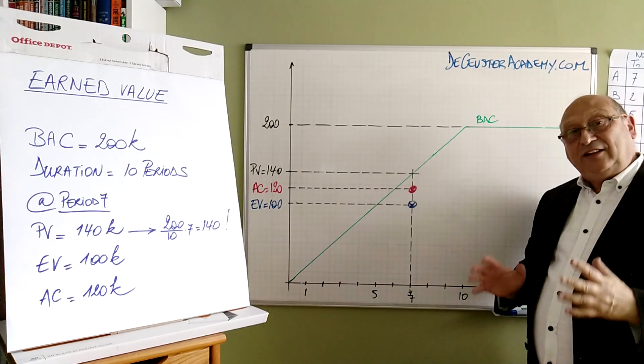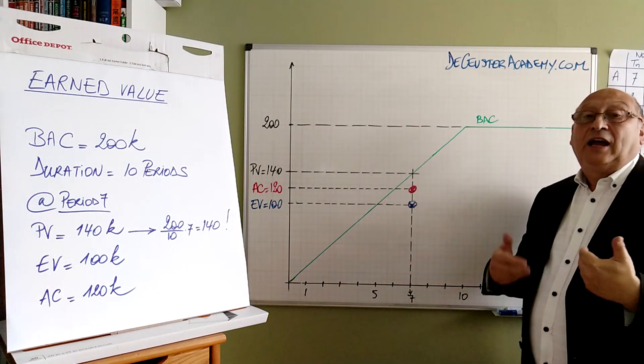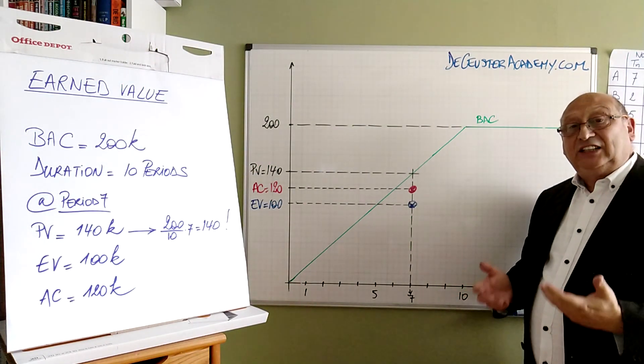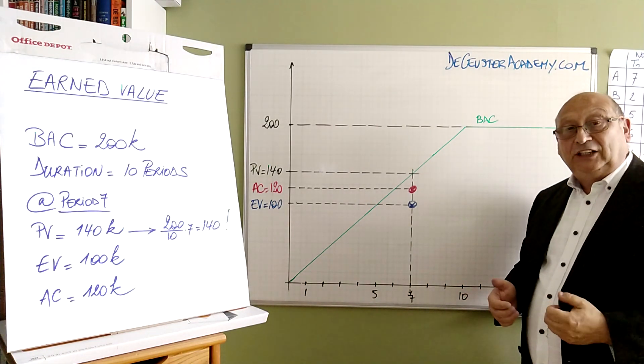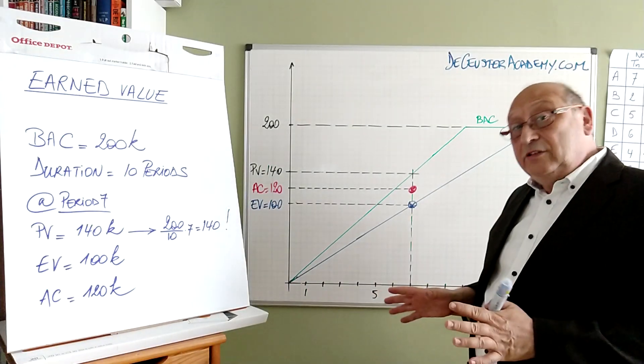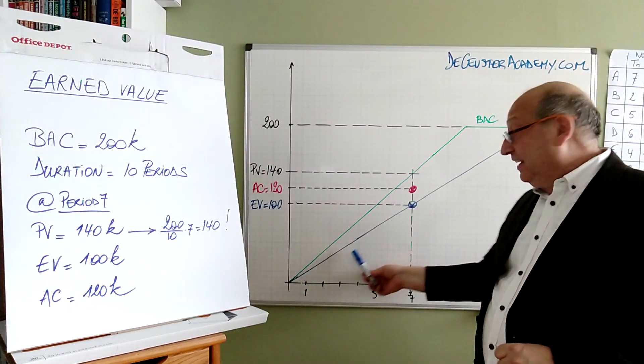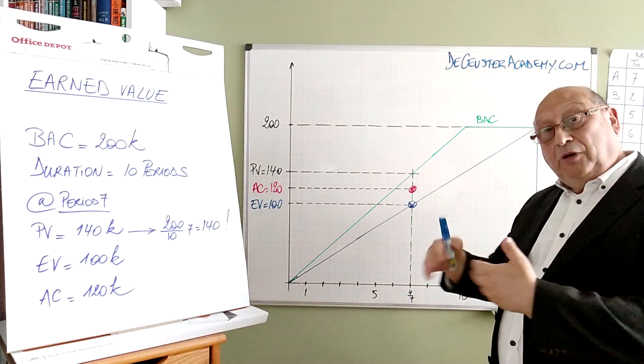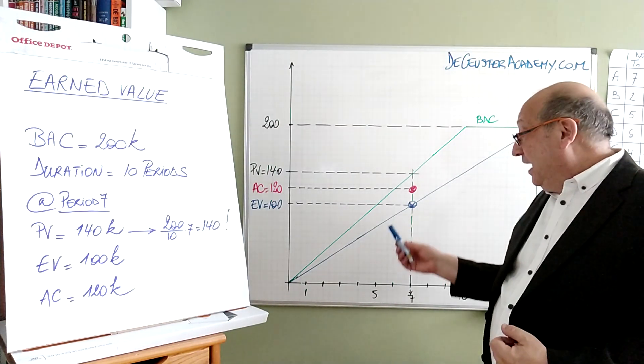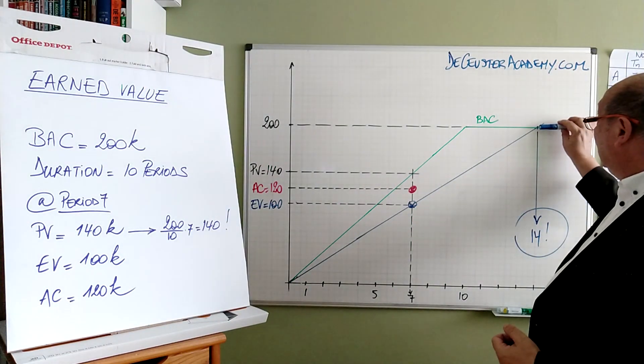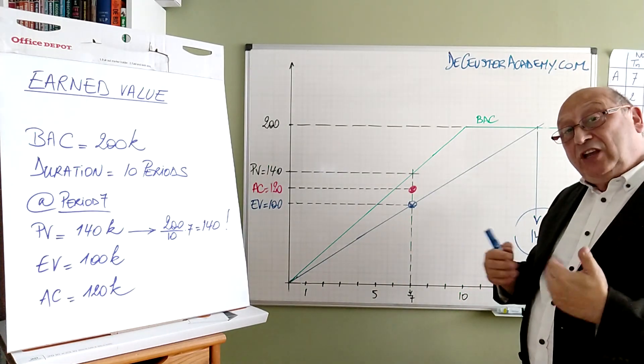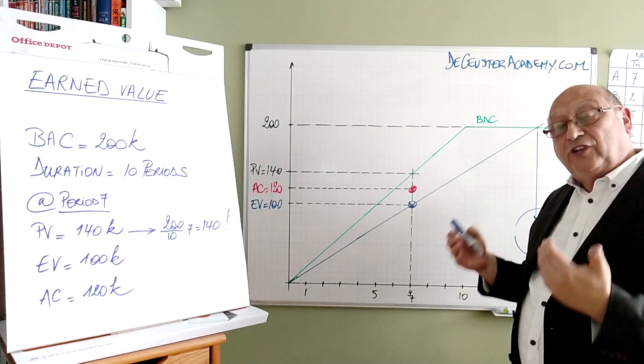The next step is to find out what is the expected end date of the project using this method, and secondly, what is the expected budget at completion or the EAC, estimate at completion. What I did now is that I extended this trend of how much we spend over time or how many deliverables we create over time. I extended it till I intersect the BAC value, the budget at completion, because we continue working until all the deliverables are finished.